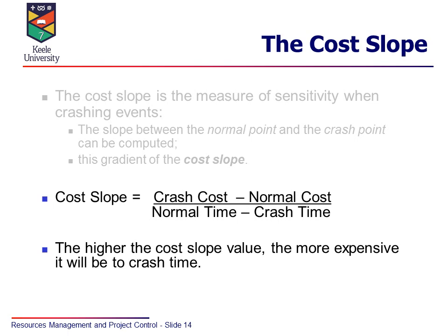You take the increased cost, the crash cost, minus the normal cost, divided by the normal time minus the crash time. So the crash cost in that last example of saving a week is £300 more, and the normal time versus the crash time was 1 week, so it's a gradient of 300. So the higher the slope, the more expensive it will be to crash times.